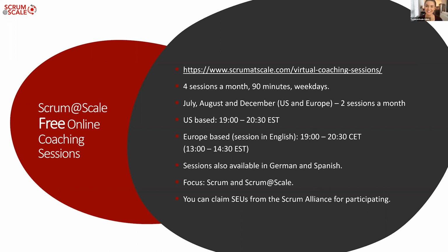Awesome. Perfect. Follow up to that is, do you derive goals from the heat map? You normally start with the goals. You have to have the goals to figure out who the actors are and the impacts and eventually the deliverables. I don't think it would make much sense to come from the deliverables back to the goal, right? So I wouldn't say derive goals. You decide what your goals are, and the map is how to accomplish those goals.